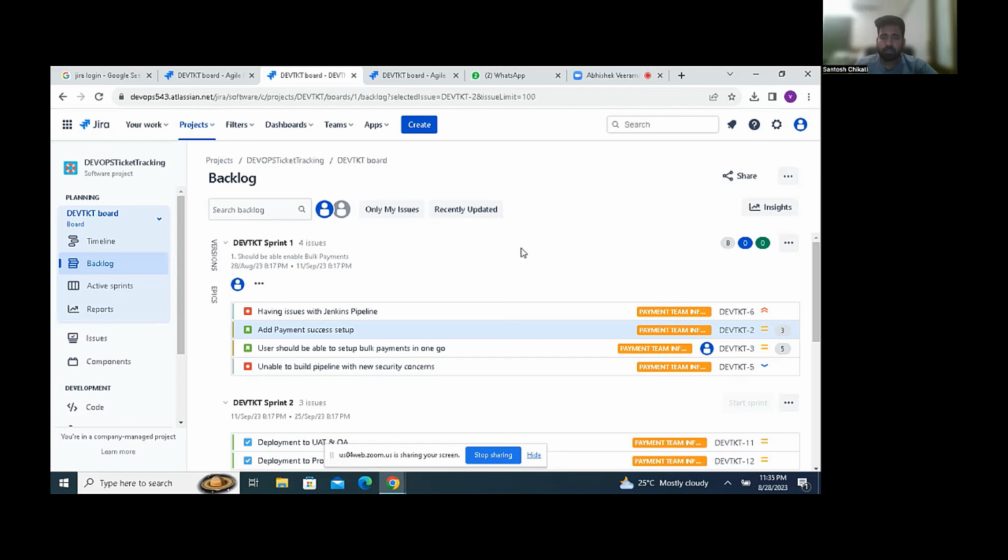For example, our capacity for sprint one is 25 points. So now we will see what all priorities can sum up to 25 points. If the product owner says, okay, though we have done refinement for 15, as our capacity is 25, let's pick these things. Then we will pull those user stories into sprint one, and we will make sure everyone is aligned with these user stories, and we are delivering all of this.